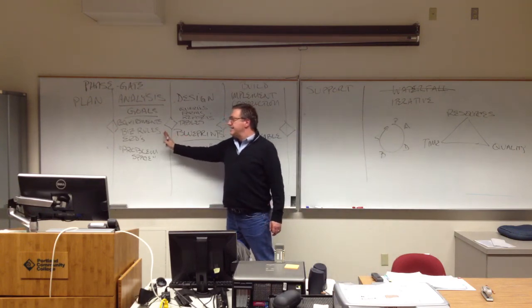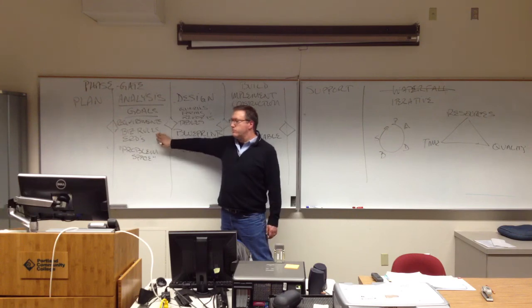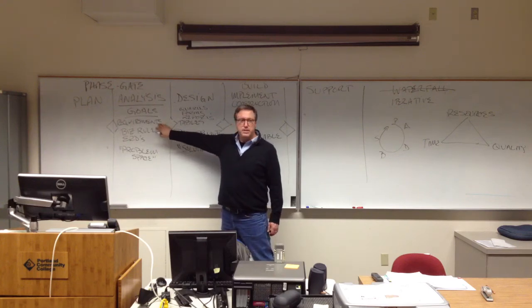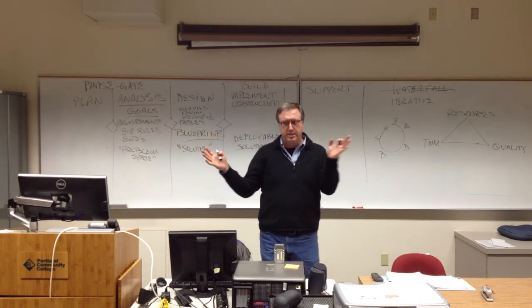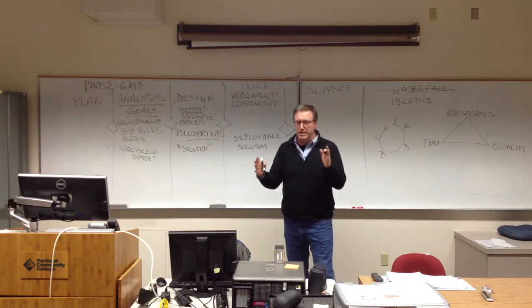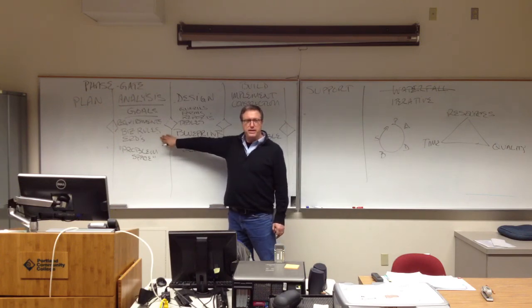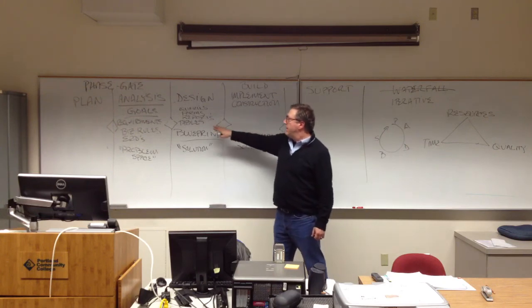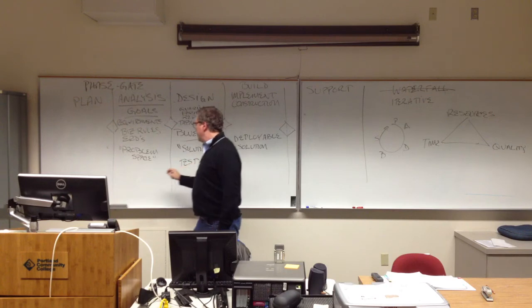Each gate has an exit criteria. How do I know when I'm done? Well, I've got a good set of business rules that my customers signed off on. I've got a good set of ERDs that my customers signed off on. I've got a good set of requirements that people like. And again, you don't need a big document. Sometimes you get a big document. Sometimes it's like, I need a website that serves up one page. And you're clear on that. You move forward. You've got to be testing at every stage.